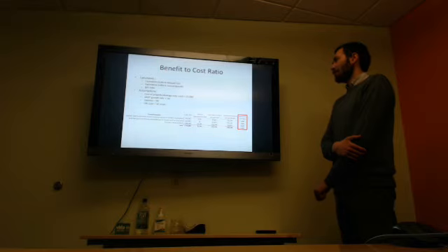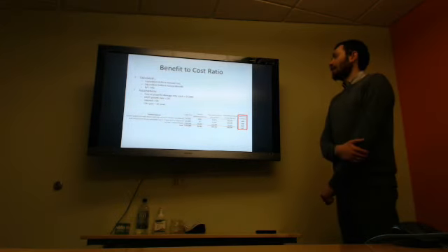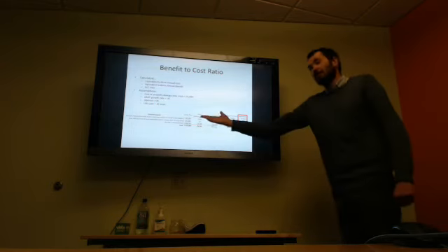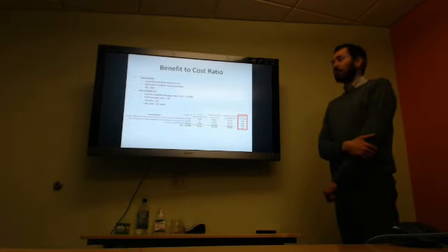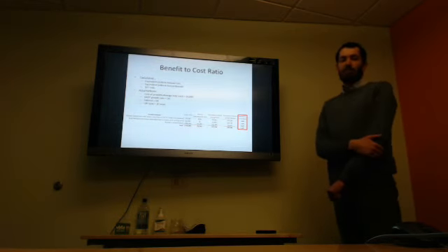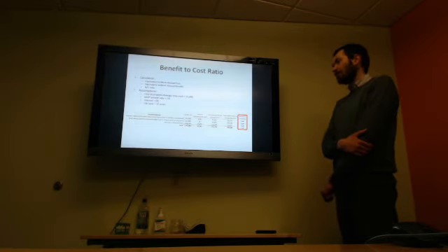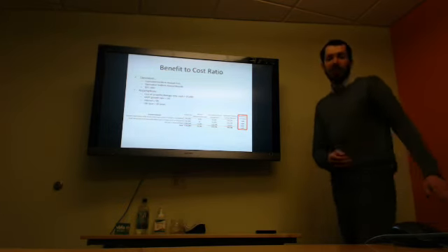So going through, the mini roundabout has a benefit to cost ratio of a little over 2, which is great. And then the road diet has one of over 6, mainly because it is just such a cheap improvement because it involves only striping. And then finally, providing a raised median is only about 0.44. So from a safety standpoint, maybe not completely worth it, but still might be a good investment for the town.